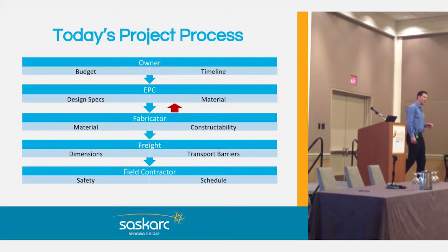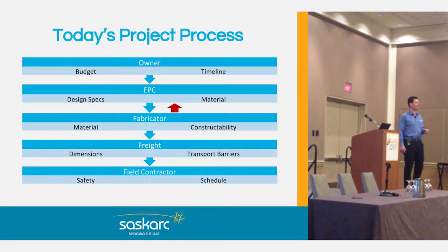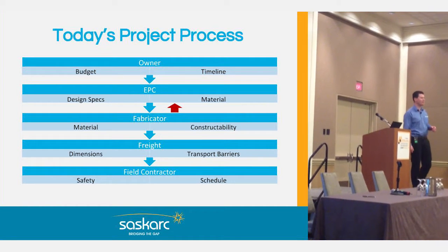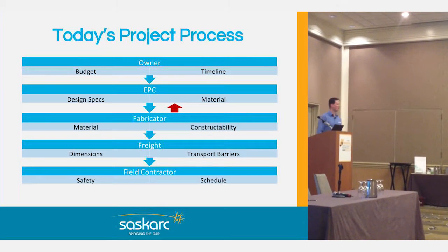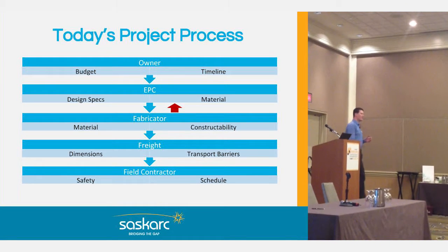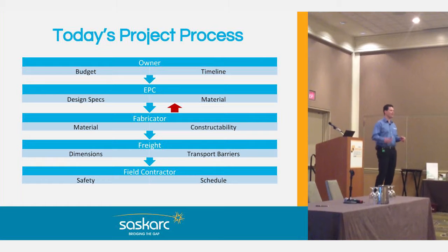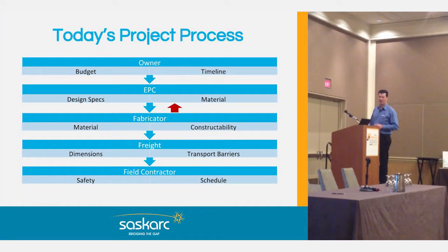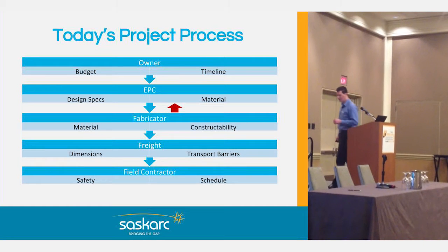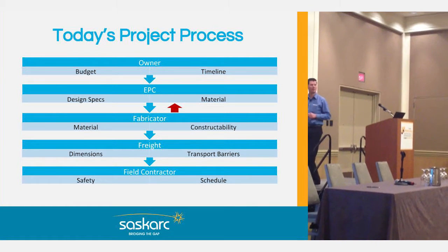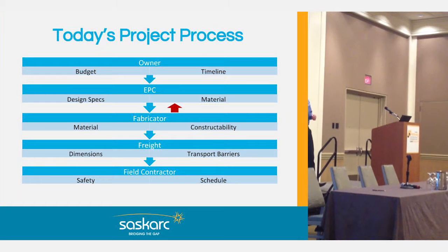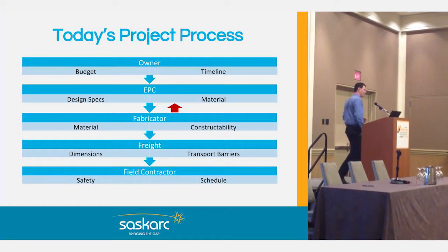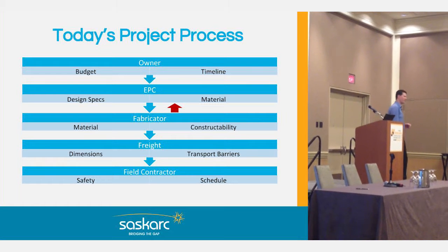As we saw before with the material grade, often the codes allow slight changes or a different material grade that is much more readily available. Often the cost is considerably less. And coming from the fabricator's perspective, we see that. We're involved in it on a daily basis through our purchasing team and our construction team, so we're often able to provide that advice and save having to go back up if we're involved earlier on in the design stage.